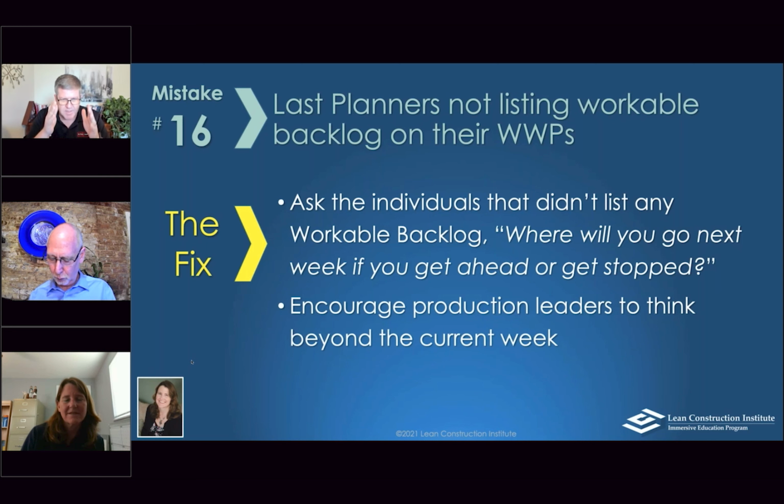We're so focused on this week, I can't think about down the road, but you've got to do it to avoid those clashes when you get ahead. And that's one of the benefits of lean: you get ahead. What you thought was going to take you 5 days, you get done in 3 days. And then what are you going to do with your crews? Well, you're going to keep them busy. You're not going to send them home. And then you don't want them jumping into something that's going to cause a problem or paint somebody else into a corner. Exactly. Mess up the sequence going forward because you had time.